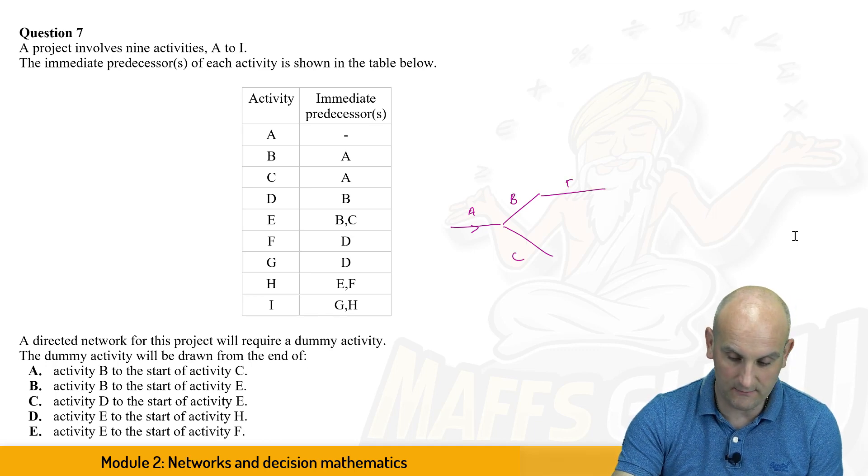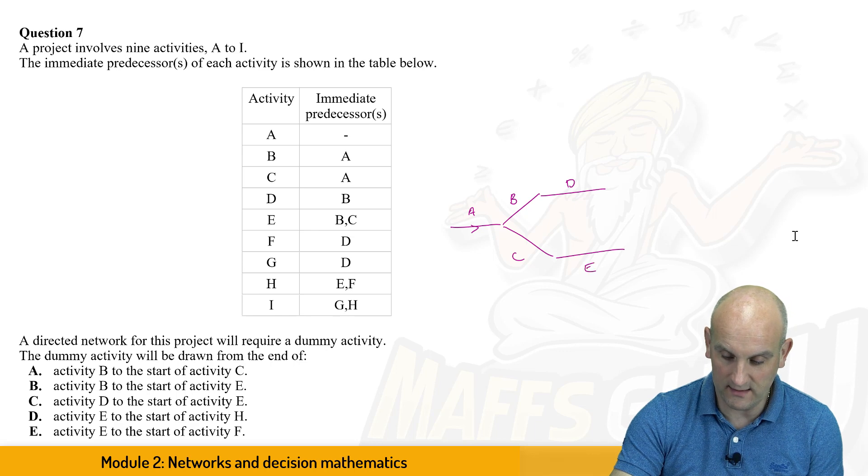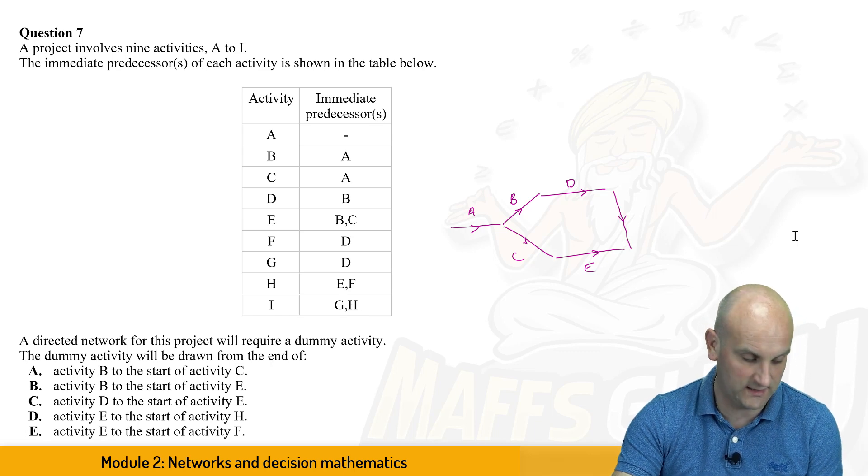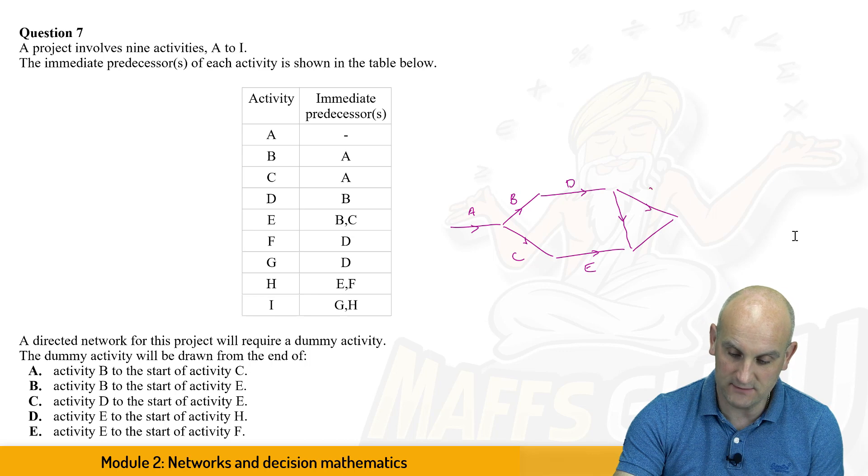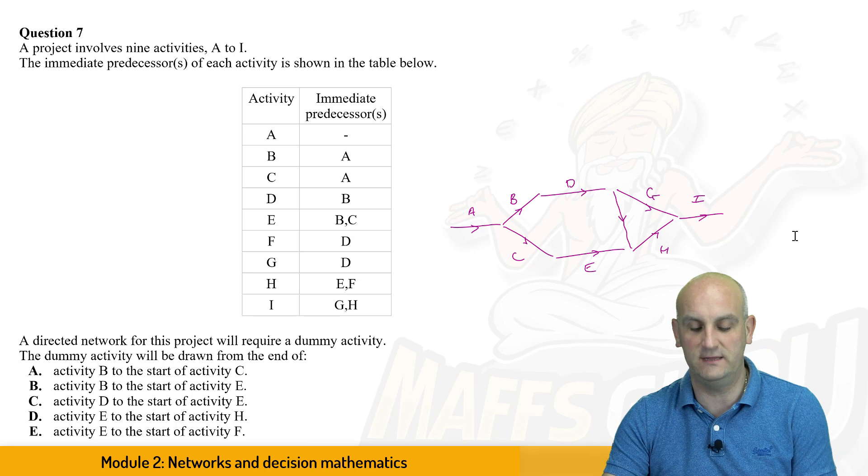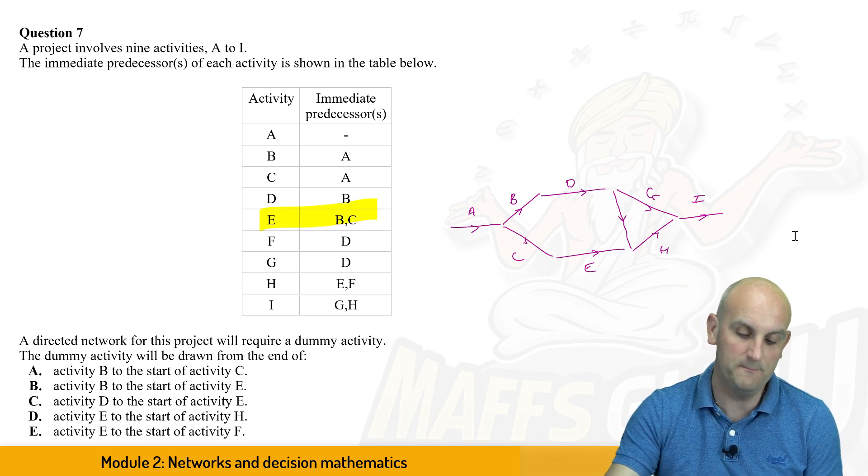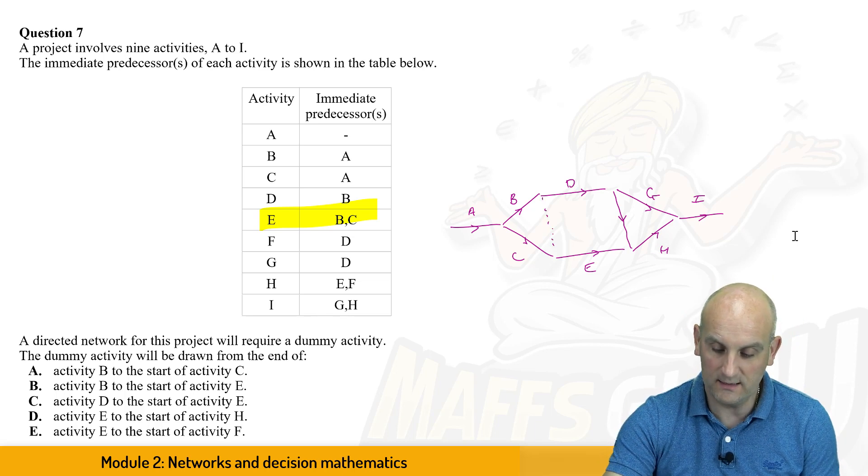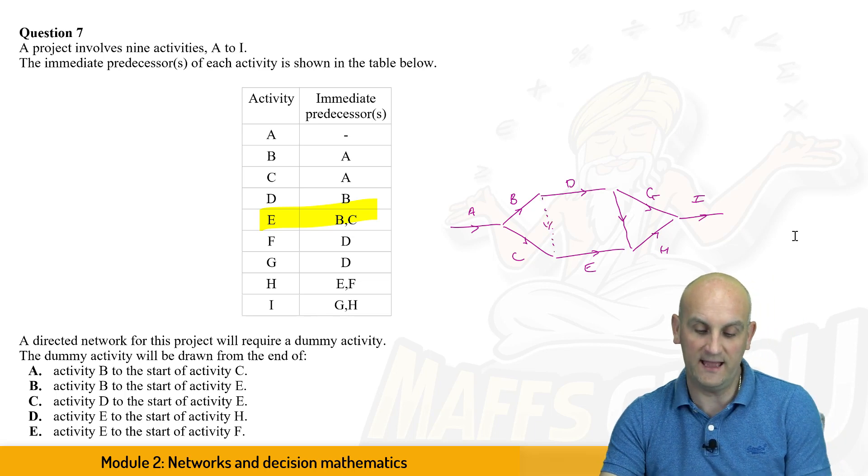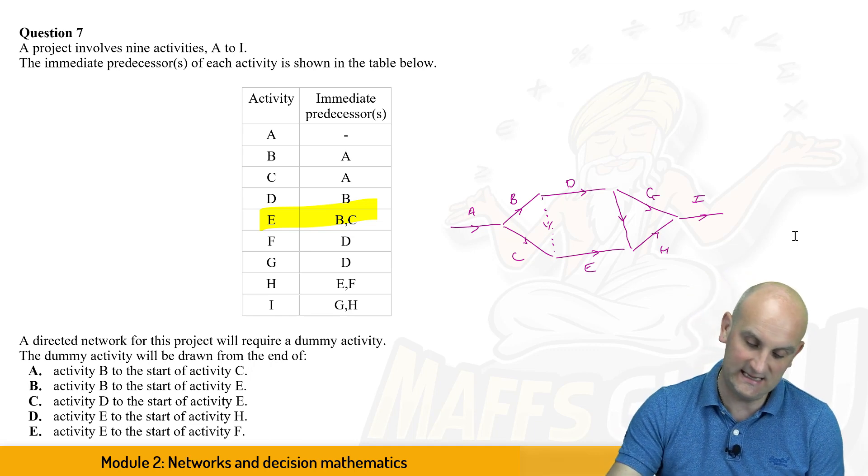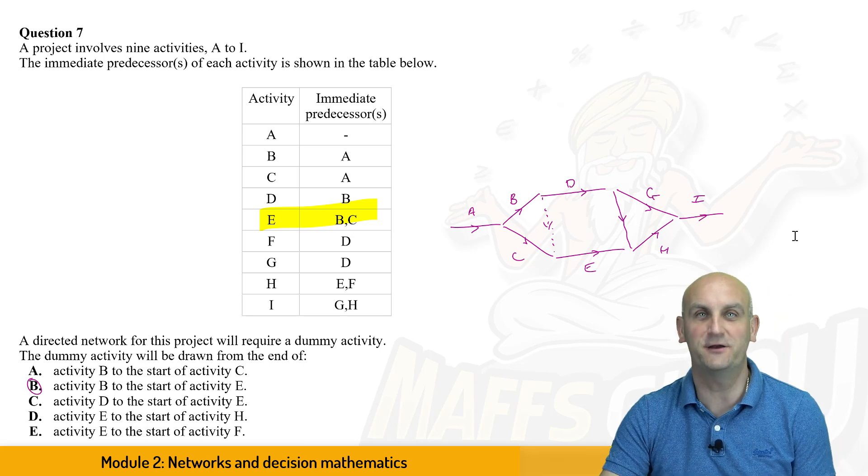I have D coming off of here. I have E coming off of here. Let's do the arrows in the right directions to get this correct. We have an F coming down here, but I've drawn it as a thick line. We have a G and a H. There is my G, there is my H, and there is my I. And for this to work, E can only start, as it says here, E can only start when B and C have both completed, and so my dummy is going to go there. So it's going to go from the end of activity B to the start of activity E, and that gives me B as my correct answer.